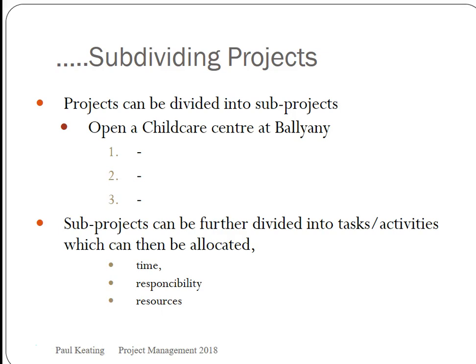The opening of the facility might in itself be a project, but the design might be a project, the construction might be a project, the decoration might be a project, and the equipping of the facility might be a sub-project in itself. And that's most likely how most projects work, that you need to break it down into constituent parts.